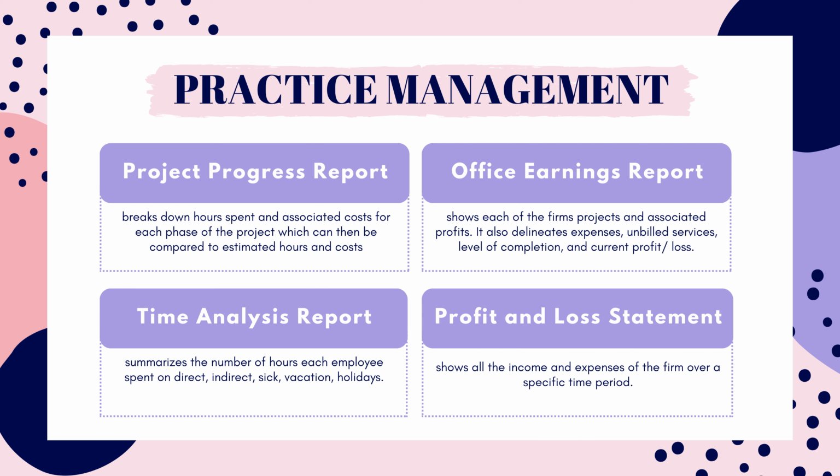Time Analysis Report summarizes the number of hours each employee spent on direct, indirect, sick, vacation, and holidays. This correlates to the chargeable ratio, which is the percentage of time spent on direct labor compared to indirect labor. This percentage should be between 75 and 85% for production staff.